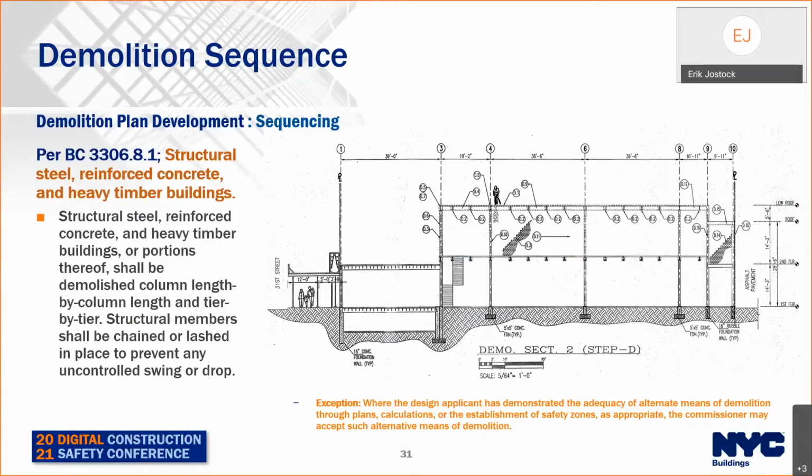There's an exception to this where the design applicant has demonstrated the adequacy of alternate means of demolition through plans, calculations, or establishment of safety zones as appropriate. The commissioner may accept such alternative means of demolition. This is commonly submitted via CCD1.